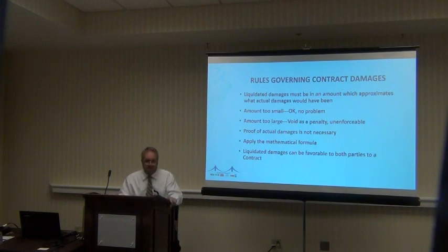Now, bringing up the casino is another good illustration. Can you only imagine if somebody's building a casino and they're late and there's no liquidated damages clause, can you imagine what the estimates are going to be of what the actual damage is? Oh God, you aren't going to get anybody in this place, this is a big sty and nobody gambles in this state anyway, you might have lost 10,000 bucks a day. Are you kidding? We would have had at least $1 million a day coming in here. And now you're fighting that in a trial. So that's another good illustration of why people in construction tend to like liquidated damage clauses.